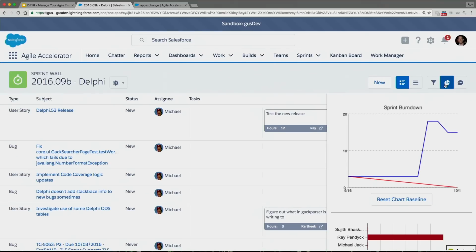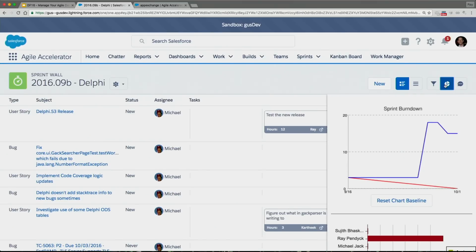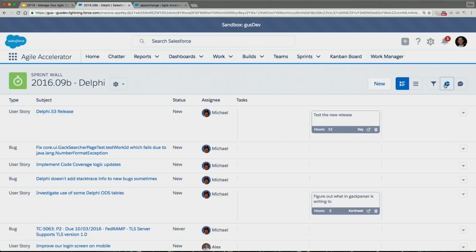And I can start to show that, and also show things like team velocity, how many people are over-allocated, how many people have perhaps said, hey, I'm on these 2 teams, I'm going to work on both of these tasks, but unless you're going to work 24 hours a day, there's not enough hours. Company holidays is another thing we take into account. You can customize your company holidays, and then the team can help show perhaps where you've been too optimistic.